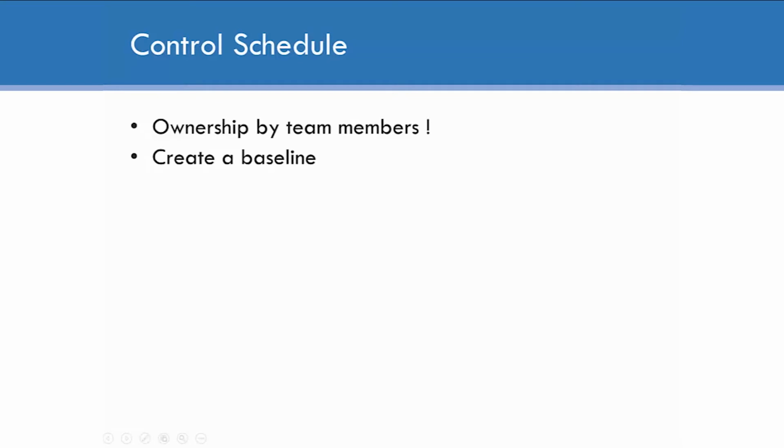And you'll create a baseline. When your project schedule is approved, probably with the rest of the project management plan, create a baseline. Take the current schedule and duplicate it by creating a baseline, which is a schedule just beneath the current schedule bars, and compare against it. As the project proceeds, you can record your actual start dates, your actual finish dates, and you can reforecast into the future. But the baseline schedule always stays the same so that you can compare against it.